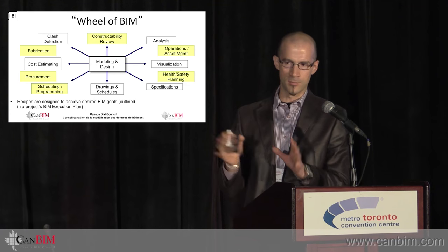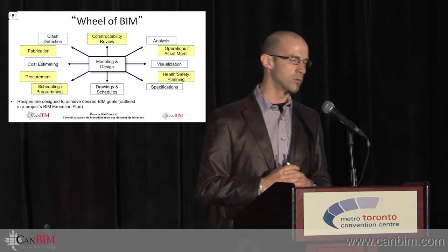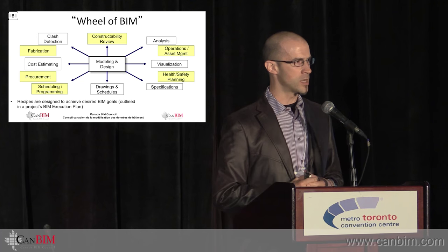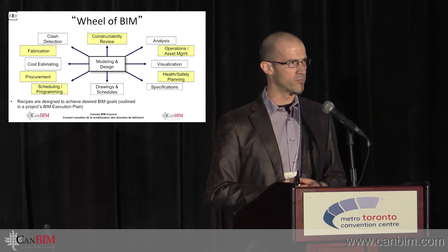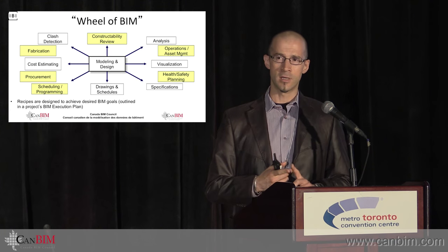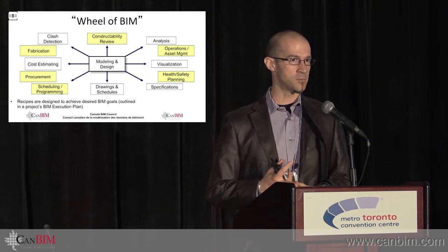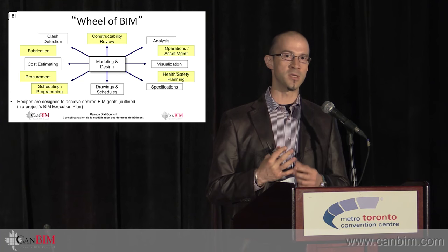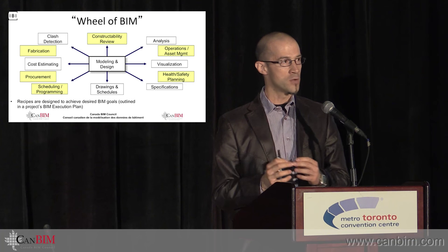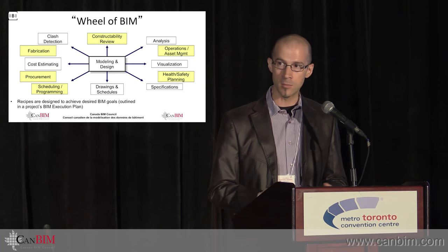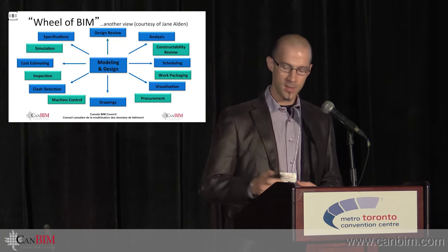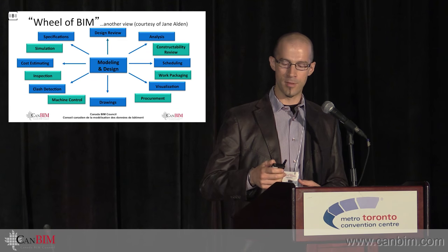The last one I'll touch on, they're all important, but operations and asset management. It's a critical one now. More and more owners are drinking the BIM Kool-Aid, if you will. So RFP requirements that used to be give me a PDF file, morphed into give me a CAD file, now it's either give me BIM, and you've got to try to figure out what that means, or it's give me your BIM files and also give me a list of these specific components. And for those components, I want these specific fields of data. And it starts to get really robust and in-depth with respect to what is being sought for either inclusion into an asset management system like Maximo or something of that nature, or just for the potential of inclusion, and you have to deliver it.